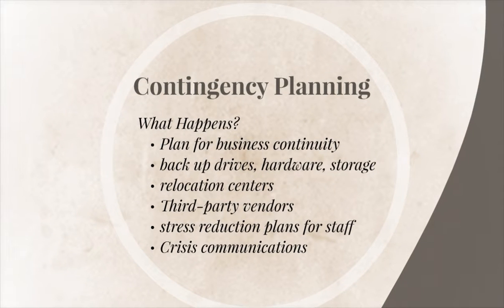Contingency business planning is really what we're thinking about here when we think about assessing the risks. We're putting out that what-happens idea. It's a plan for your business continuing if something happens, and mitigating the risks that it would take to have a work stoppage or a shutdown or an accident. Think about this. We all do what? Backup drives. Maybe we buy an extra piece of hardware and have it in storage, so that if a computer does go down and is affected, we simply take out the machine, move it back, and let the employee go back to work. We're talking now an hour's worth of stoppage versus, who knows, a week.